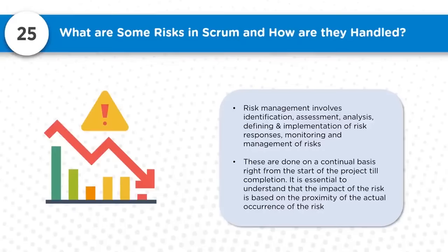and manage the risks. Now, risk impacts and probabilities may vary as the project progresses. So we may require to keep assessing the identified risks and keep identifying new risks as we progress in the project. So these are done on a continual basis, right from the start of the project till completion. The reason I told this is, it is essential to understand that the impact of the risk is based on the proximity of actual occurrence of the risk.